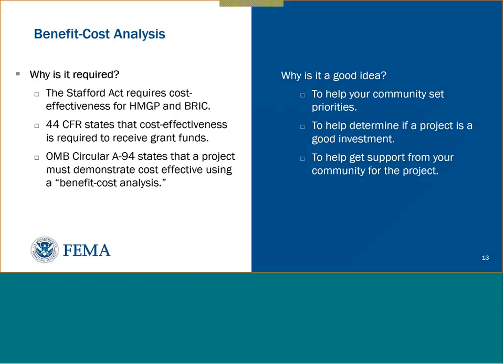These are required for construction-related projects, and the notion is to look at the project to see if it's going to save us at least $1 in damages and lost serviceability of our community services for every dollar that we spend.